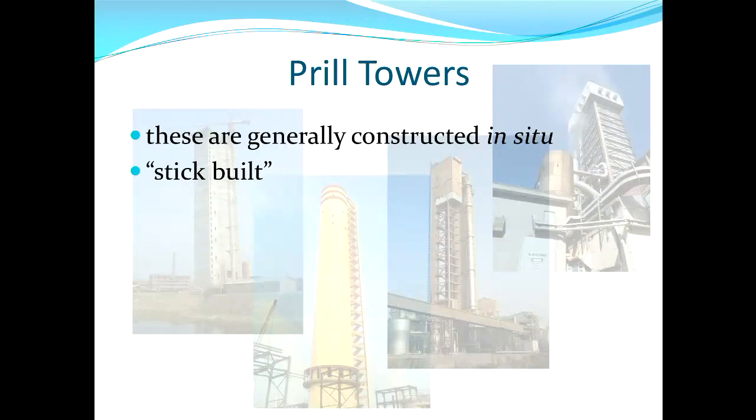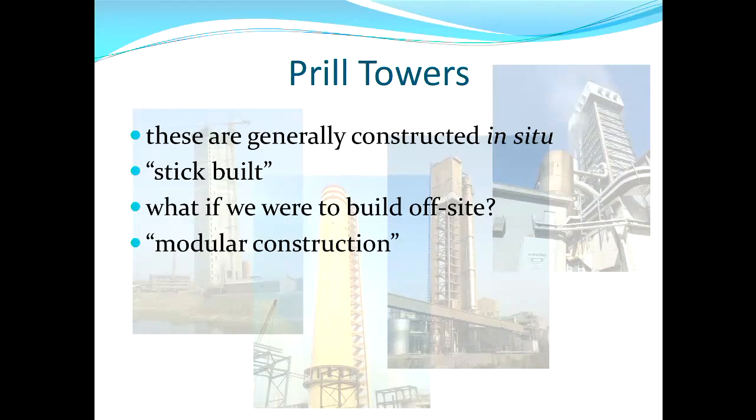In general, all these historical examples of prill towers have been built in situ. They've been what's called stick-built. You carry all the sticks of steel in, or you pipe the concrete in, and you build them gradually in place. So the creative question was asked, what if we were to build this new prill tower for Orica off-site, to use modular construction, build the whole thing in a factory somewhere and bring it to site and in a very short period of time stand it up.